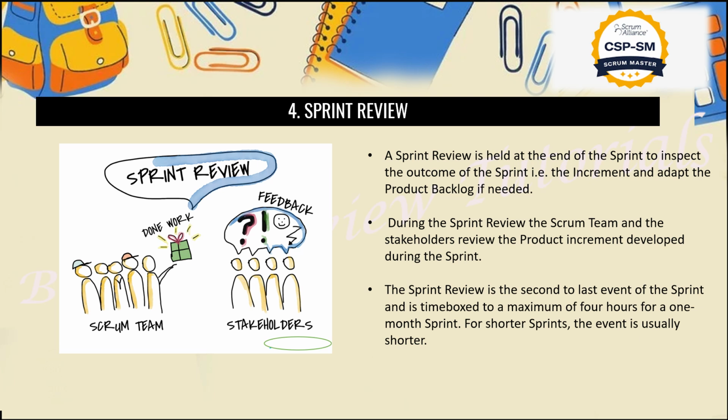Okay, understand there is a difference between the daily Scrum and the sprint review. The sprint review will be held for 4 to 5 hours, or lower or higher, totally depending. The daily Scrum will be for 15 minutes to understand whatever work we have done for that particular day. The sprint review will be done for a longer time in order to understand whatever work we have completed, whatever work not, and when the sprint is completed, how the piece of the product is looking now. So there is a difference between the daily Scrum and the sprint review, guys, make a note of it.